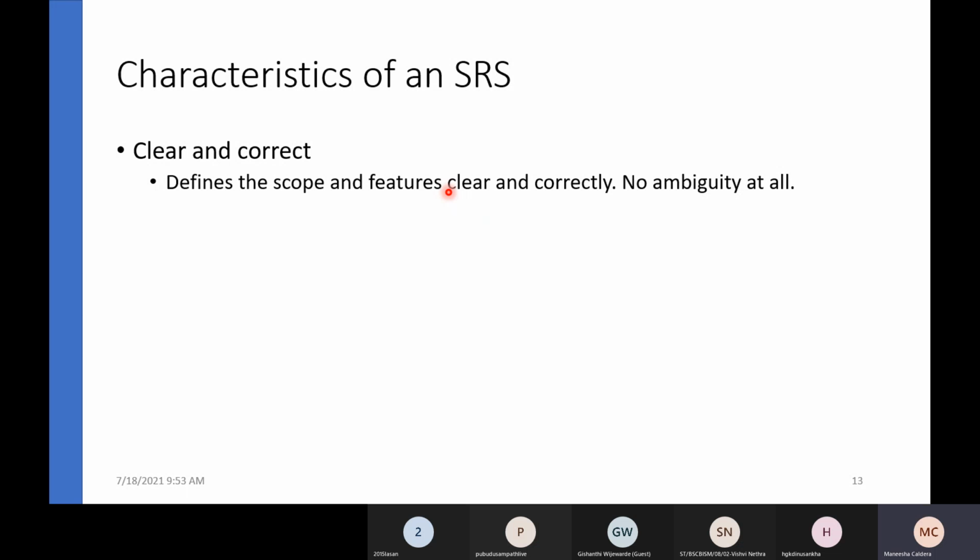It should be minimum this much. It should be maximum that much. In that case, we don't know what your requirement is. That's why we have delivered an SRS. So it's your responsibility to understand it well. If you want another modification, yes, we can do it for you, but you have to pay for that, because there's additional effort, right? That's why we want it to be clear and correct.